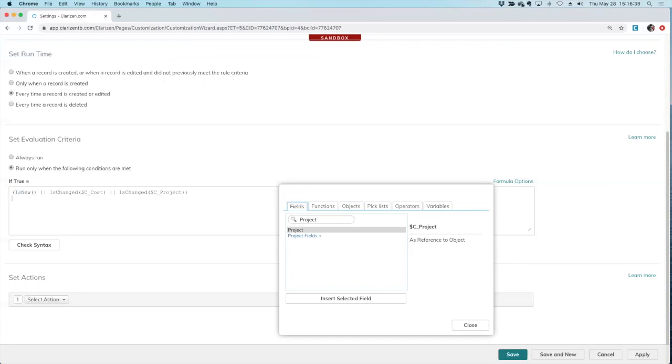And we also want to make sure that we're only adding time phase data when we have a related project, because we don't want to try to update time phase financials when there's no time phase relation. So we'll have to say not is null. So we can't have nothing in the project field. We have to have a related project.